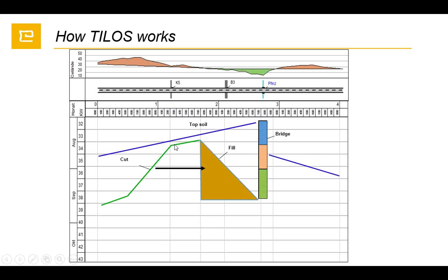We can get the system to calculate the activity durations from our productivity rates or from the quantities on the site. There are other calculations, but the most important one in this case is the duration. The system can calculate and give you a more realistic duration.